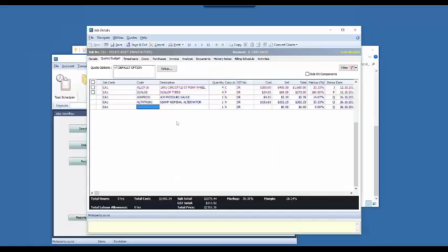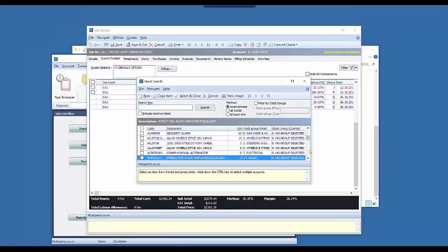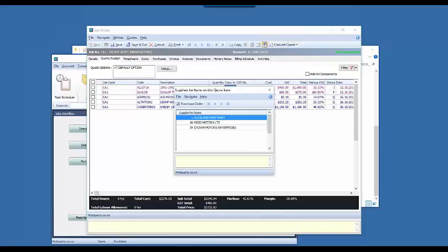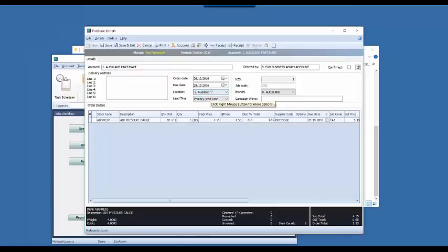And we just go down and obviously we've got suppliers set against all of these stock items. Once we do that, I've got this copy to column, and if you hit P for purchase order, there, and save, one of these buttons here, this one, generate purchase orders. That will generate the purchase orders to all the different suppliers for those stock items, and it will insert it into there so that when you receipt the stock in, it comes in tagged with the job number and goes directly against the job.